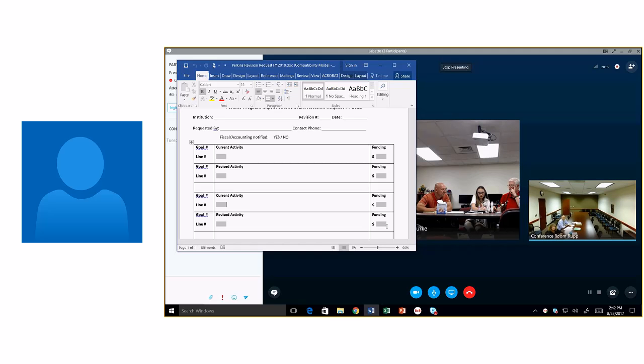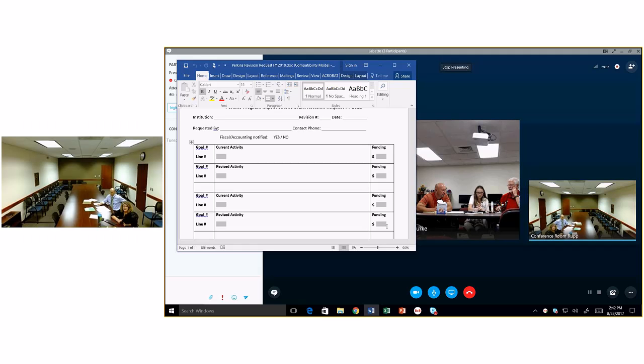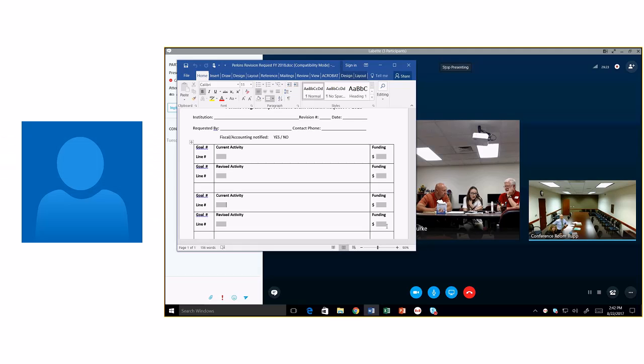Okay. But we also have to put that documentation, correct? And you need us to write that explanation in that box, correct? Yeah, just let us know why it's $0. And you've written it out well in your email. I can tell that you were going to get a part for a piece of equipment and they no longer make it, so now you have to buy the whole piece. Yeah, he's buying from a different company is what happened. So it's going to cost more because of that.